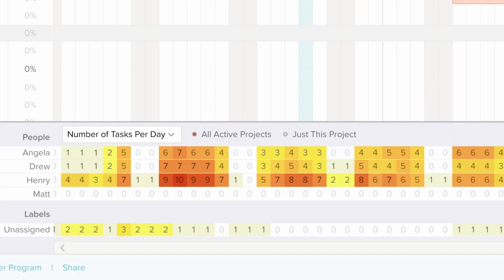So now some folks might be saying, hey, you didn't schedule any tasks before you assigned people. I don't get it. And to them I say, you're right, but that's what I'm going to do next. I actually like to have tasks entered and assignments in so I can keep an eye on the view availability tab in TeamGantt while I'm adding task estimates and scheduling on the Gantt. That way I can rest assured that I'm not overbooking my team. And if I am overbooking, I can make some quick schedule adjustments with a drag and drop and really avoid major issues.